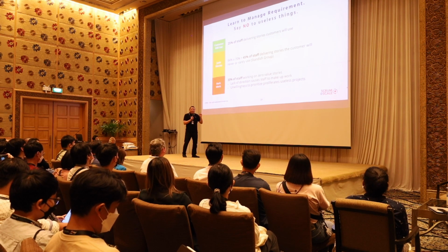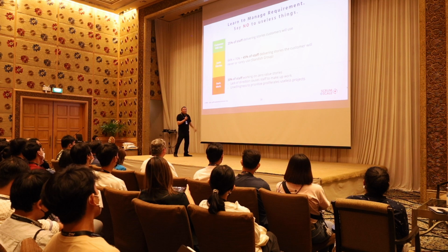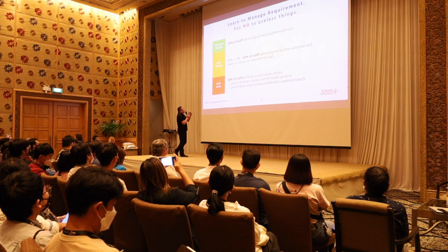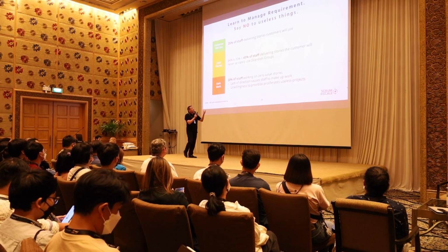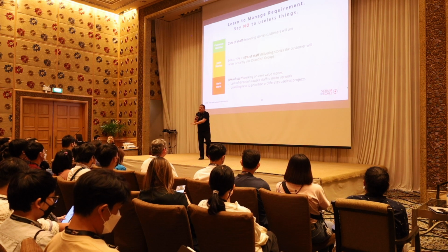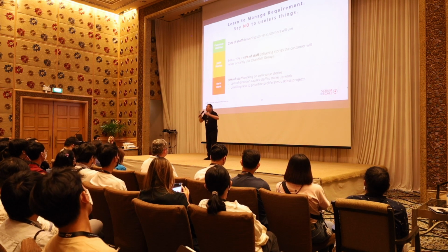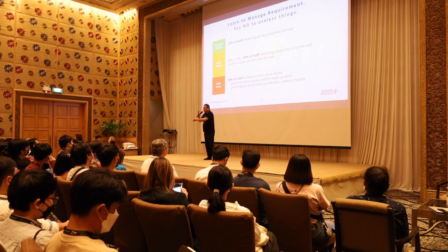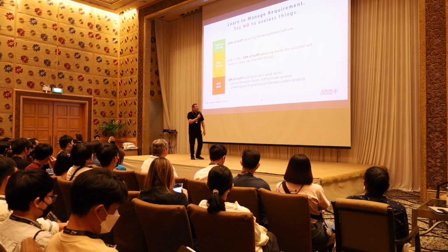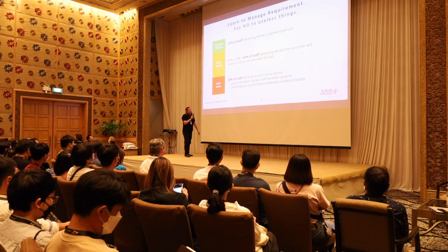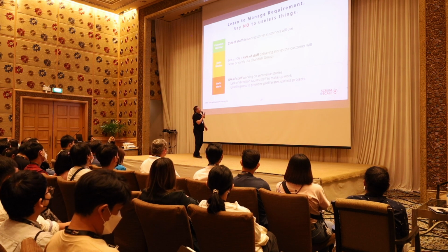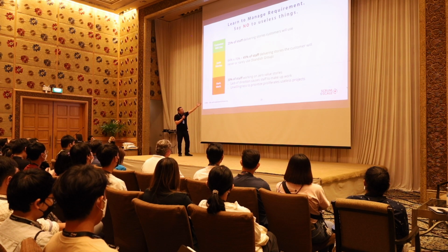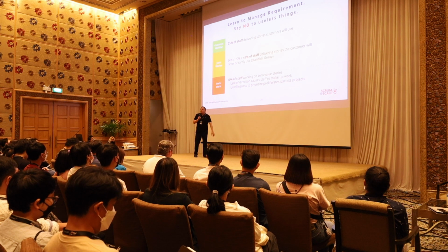And one of the things he realized is that most of the time, the things in your product backlog don't feel right. Only 25% of the staff are delivering stories customers will actually use. And this is not about you, this is not about Thailand, this is about the entire world. Every place that Dr. Sutherland went to, everybody's having this problem, right? And 45% of staff are delivering stories that customers will never or rarely use. And worse, a third of the time your staff are working on zero value stories.